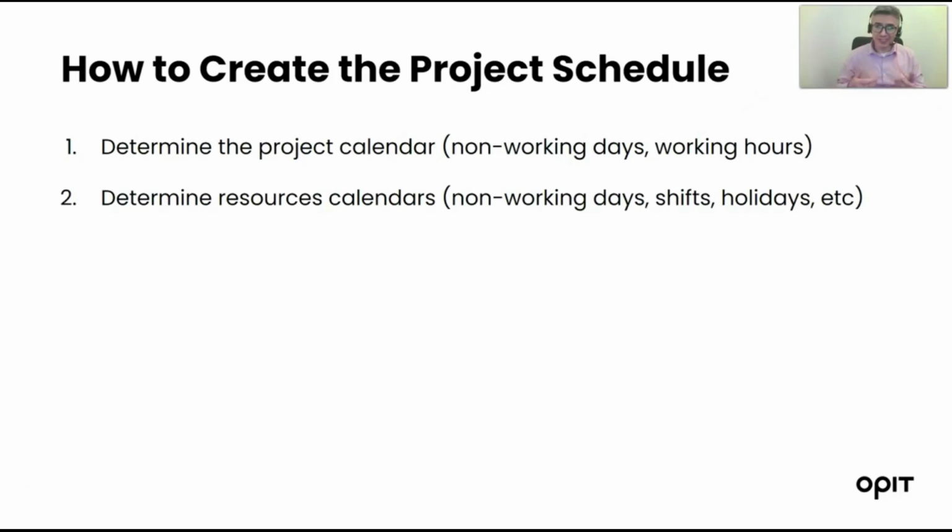And when we start assigning tasks to resources, we'll see when they will be executed, because we may be planning to execute something, but we only have one person and this person will be on vacation. So this gives us the idea that we should replan, postpone the task, or figure out a replacement for that resource. Otherwise, the project will be on hold, or this task will be waiting for some person to take it.